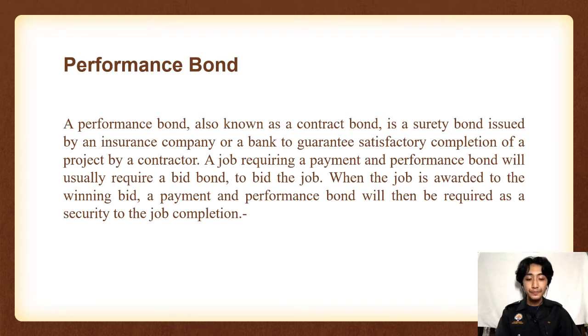For example, a contractor may cause a performance bond to be issued in favor of a client for whom the contractor is constructing a building. If the contractor fails to construct the building according to the specifications laid out by the contract, which is most often due to the bankruptcy of the contractor, the client is guaranteed compensation for any monetary loss up to the amount of the performance bond.